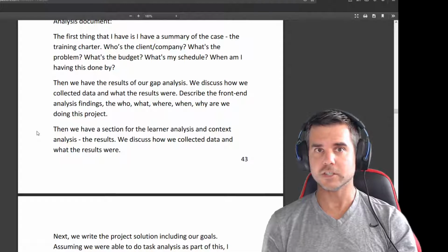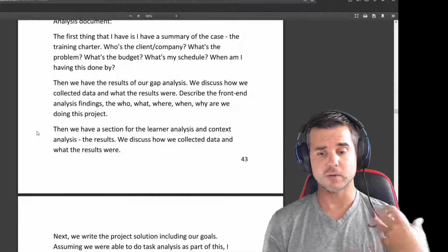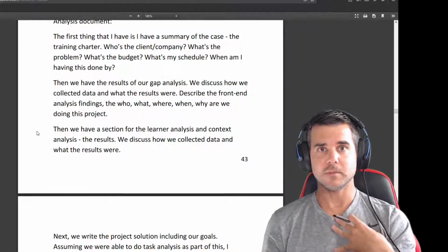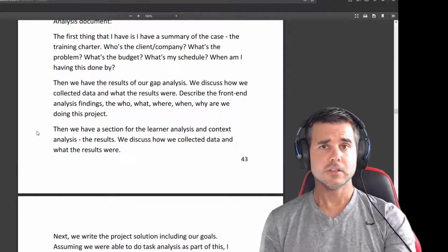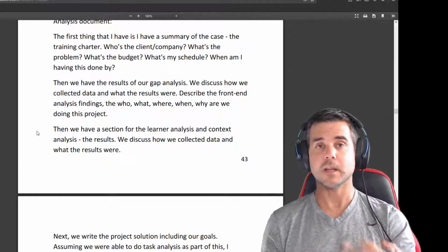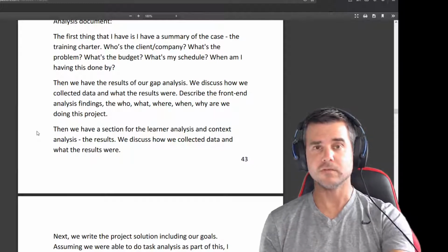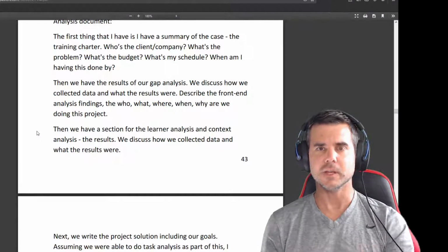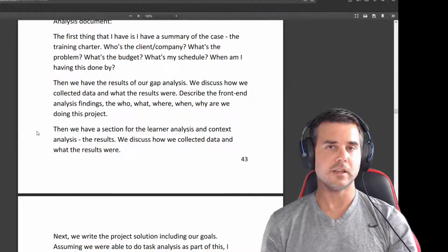My current project is more about, they want it to be a course, like a college course, so it's going to be more like weekly, and that helps me estimate because I know what graduate level students can handle. So it's easy for me to say, okay, they're probably going to be about 3 hours of content per week. Maybe between 2 and 4 hours per week, depending on the week. Some weeks more, some weeks less. So I have an idea of the content that it's going to take to develop.